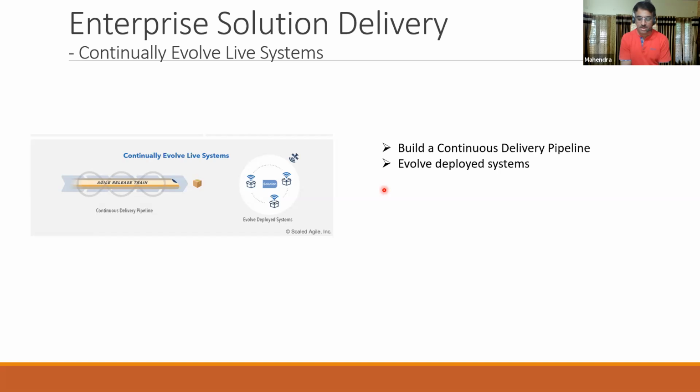Let's say the Scrum team has picked up 5 stories as part of their sprint backlog. Rather than all the members working on all 5 stories and giving them to testing on the 7th or 8th day, we have built a beautiful waterfall into a 10-day sprint. Now, can we apply WIP there? Yes, we can. The best WIP is one. Let all the members work on one.